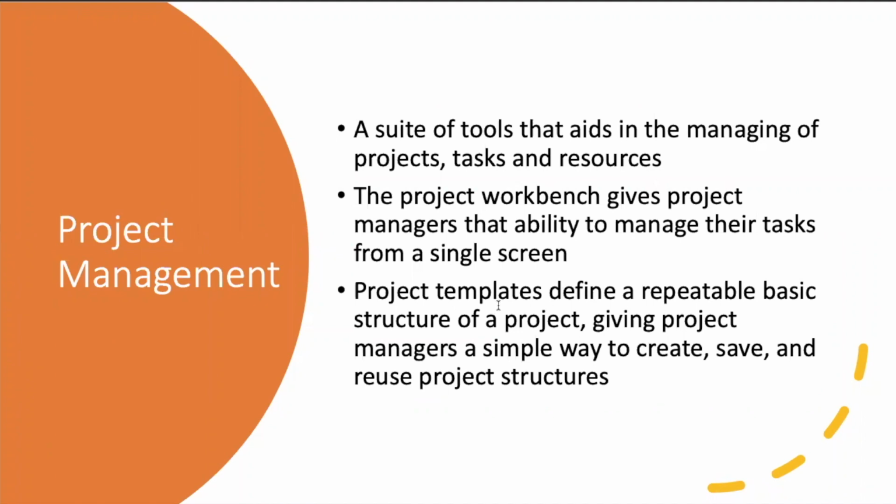Another recommendation is project templates. If you can get the client early on to agree to some templates, it's kind of like tasks for like functionality. It makes it a lot easier than them trying to import big Microsoft Project files. ServiceNow is notoriously poor at integrating Microsoft Project with their project tool. It's very limited in the import.